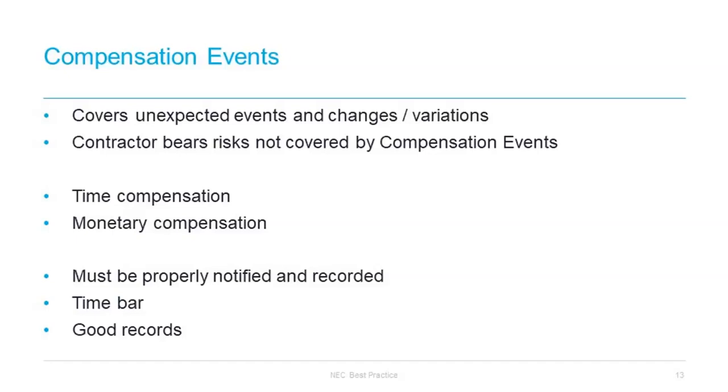This is likely to reduce the monetary compensation due to the contractor, and perhaps the time compensation, because the project manager can assume that all appropriate mitigation and early solutions to deal with that event were put in place and compensate the contractor on that basis. So the contractor can be penalised in terms of the compensation outcome for not submitting an early warning notice.